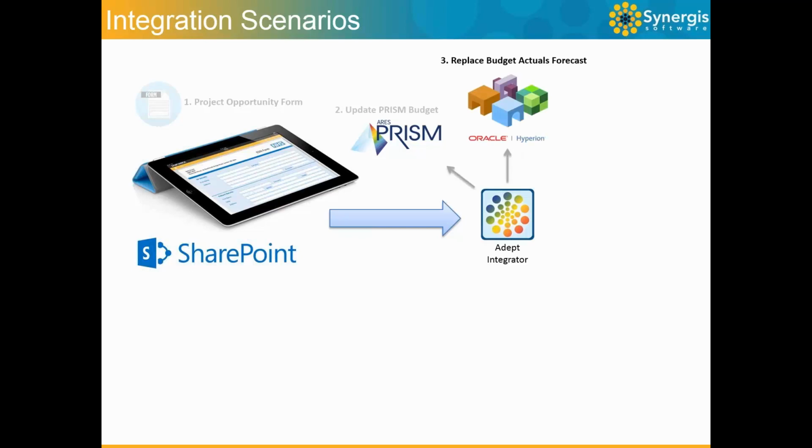And then once it's updated into the cost management system and the project has been created, it needs to go up into some sort of business intelligence tool at the top end, so that the users, executives, can see how the portfolio of projects may look. From there, the opportunity has been created. Now, the client needs to apply for funds, or we need to go through some sort of workflow, or what I would call a delegation of authority, to approve those funds.